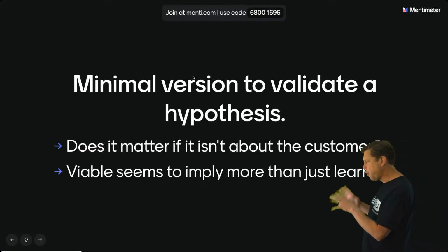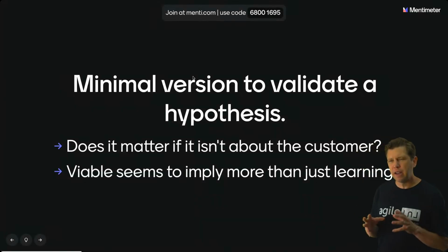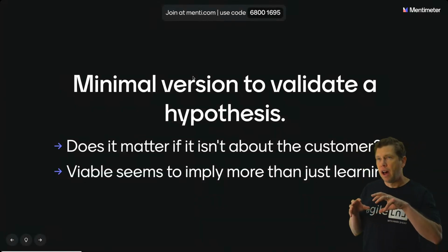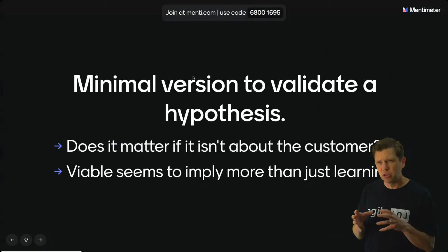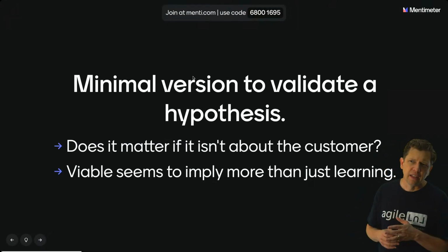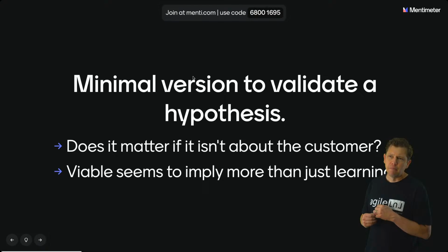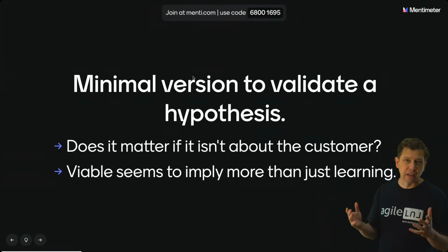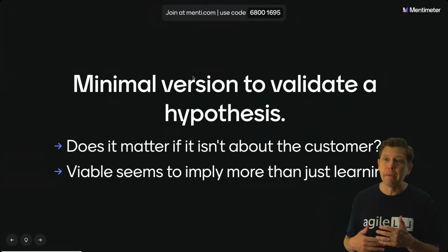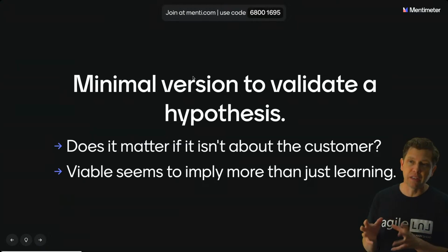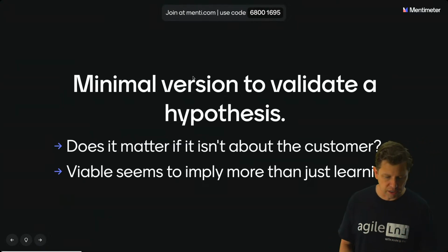So if you're hearing MVP used in a way that doesn't imply any type of feedback from customers or people that might use your software, you should probably be wary of that, because it might be an indication that you're headed down a path that's going to produce maybe lots of code, maybe take lots of time, but without getting feedback. It may make it easy to spend lots of time producing something that turns out not to be useful to your customer.